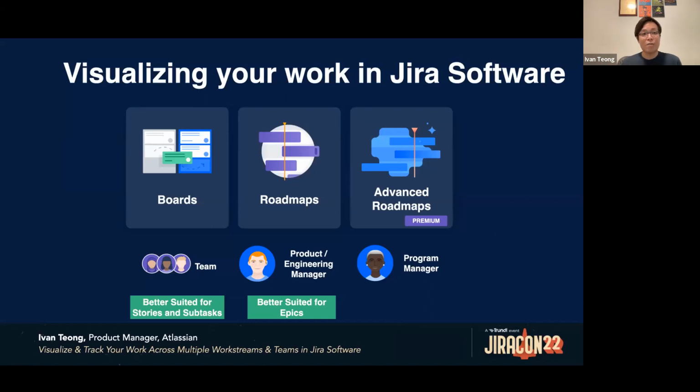After we introduced roadmaps, it became better suited for planning epics at the team level. Planned features can graduate to the roadmap as an epic or to the backlog as a story. They would then end up on the board when prioritized for the coming weeks. Of course, the backlog continues to have value for sprint planning and backlog grooming.